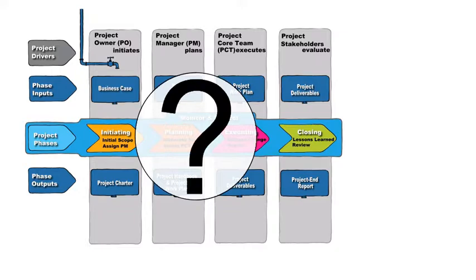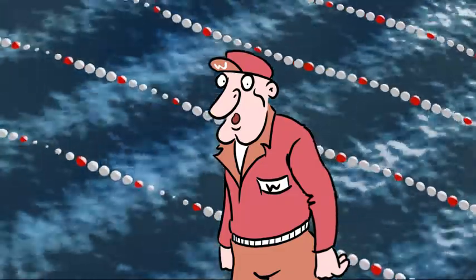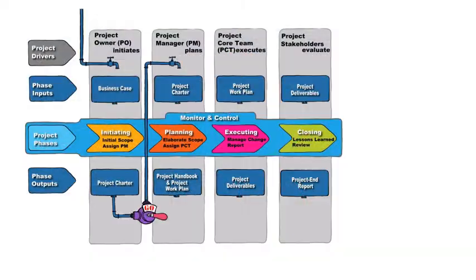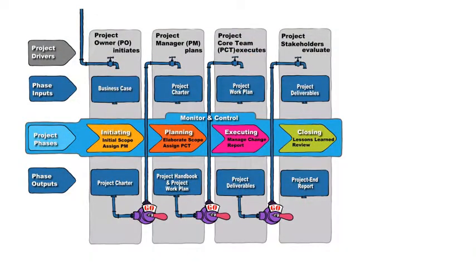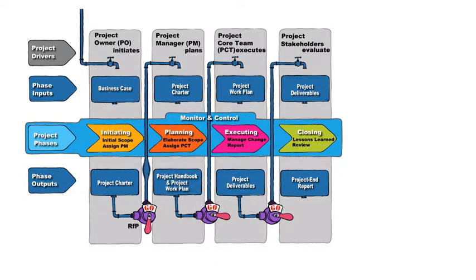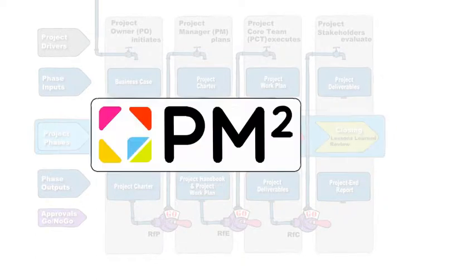You may be intimidated at this point. However, don't despair. You're not required to swim the entire length at one go. The method provides pit stops, allowing you to take some rest. Stage gates are the pit stops that make the process more manageable. The key stage gates are decision points at every transition of a project phase. Ready for planning, abbreviated as RFP, implies the start of the planning phase and legitimizes the project manager to take charge.